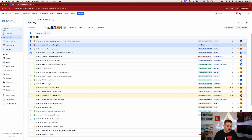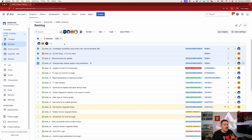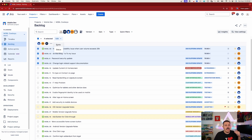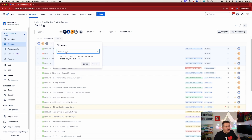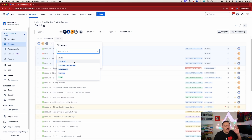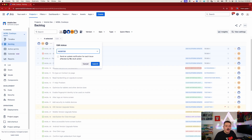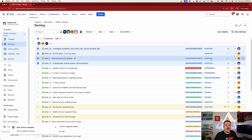Instead, what you need to look for — and I'm going to zoom in here because it's a little hard to see — when you select multiple stories, you're going to see text that says 'for selected.' This is the new bit: you have an edit field, and when you click on that, it gives you two options. We can either bulk edit fields (we'll save that for another video) or we can bulk transition the status. I'm going to click on that, and now it will ask me what status I want to go to. I'm going to move all of these to 'Accepted.' You have the option to send a notification to the folks affected by this bulk change — I never do, I just don't like blowing up people's mailboxes — and I'm going to click Submit.